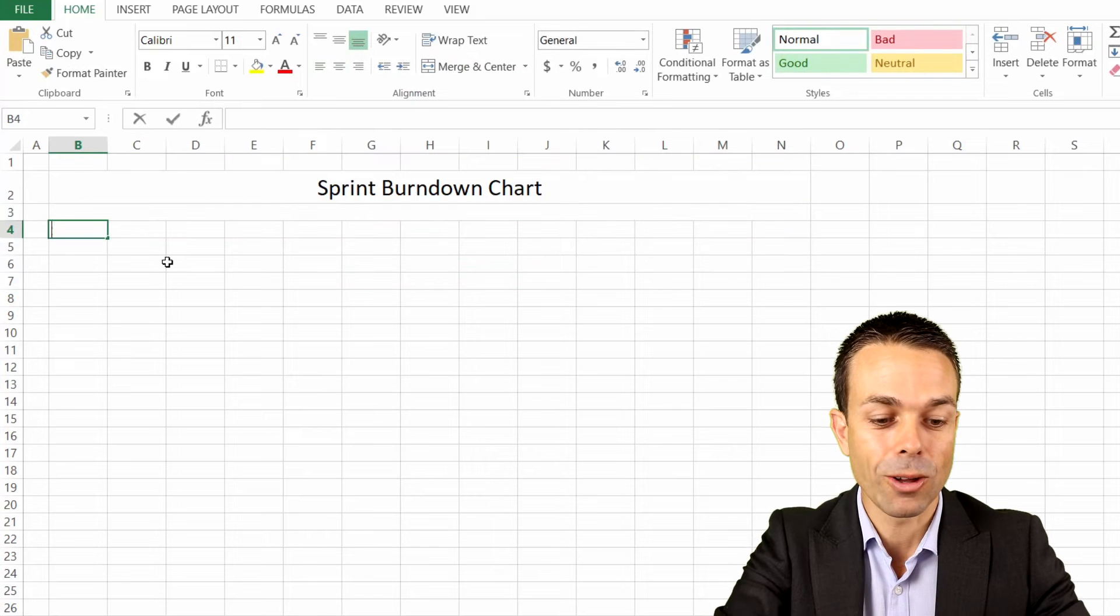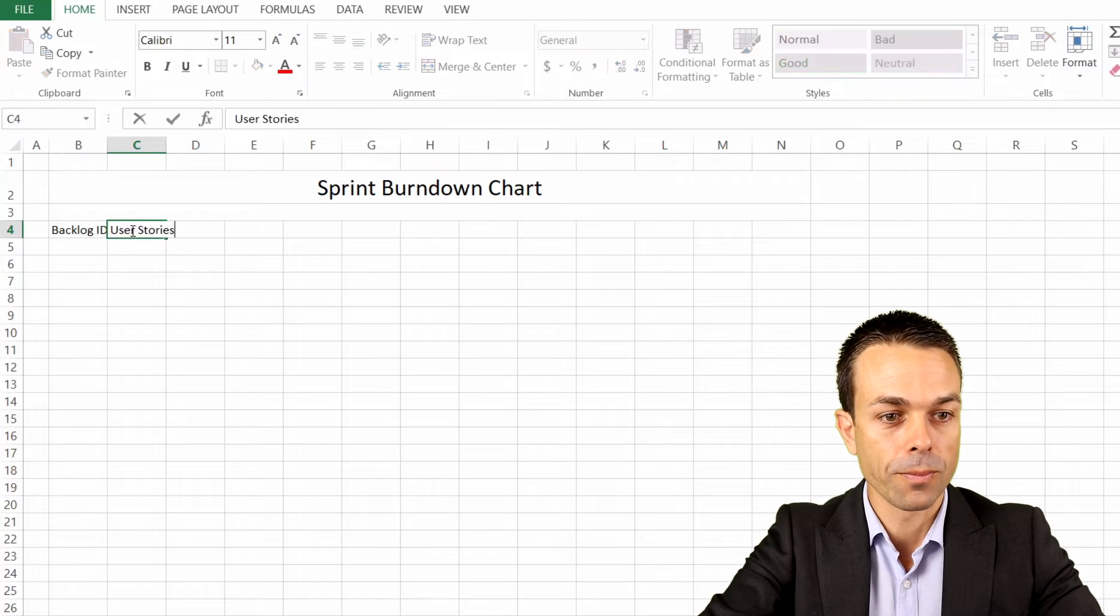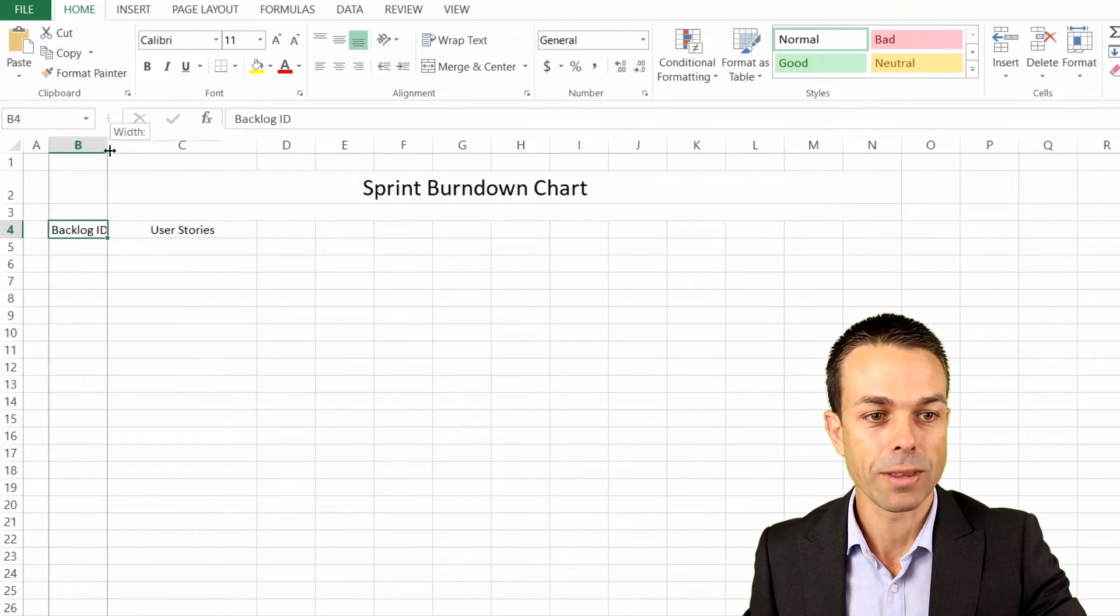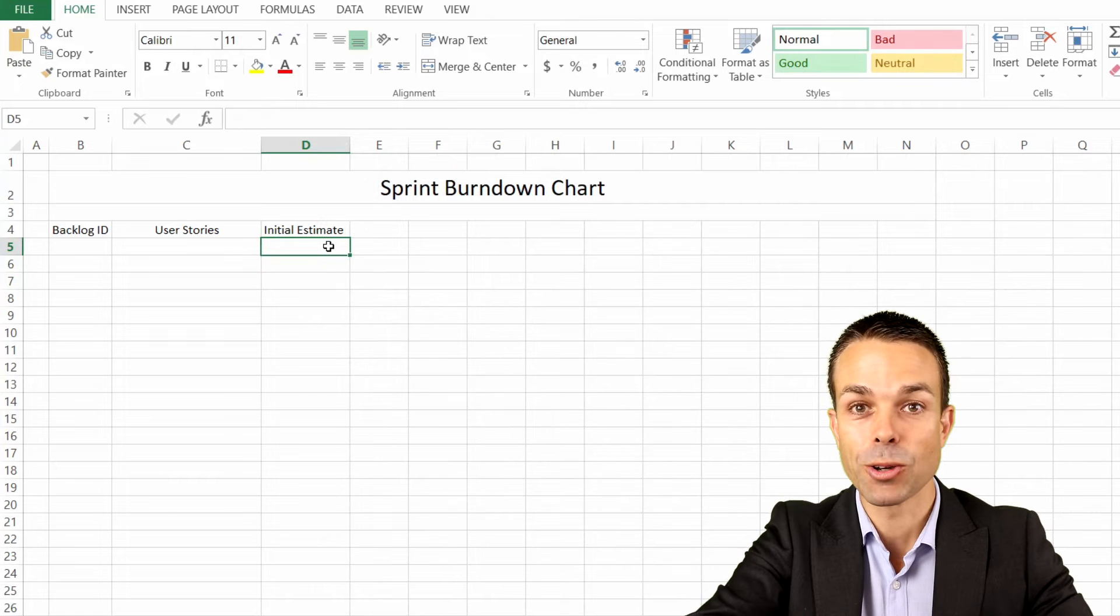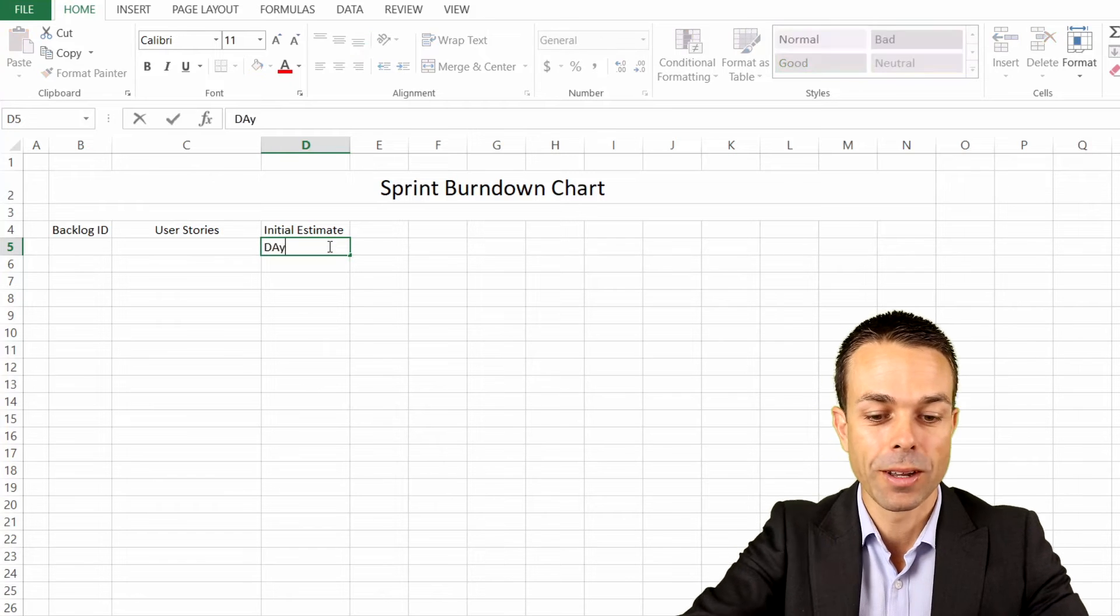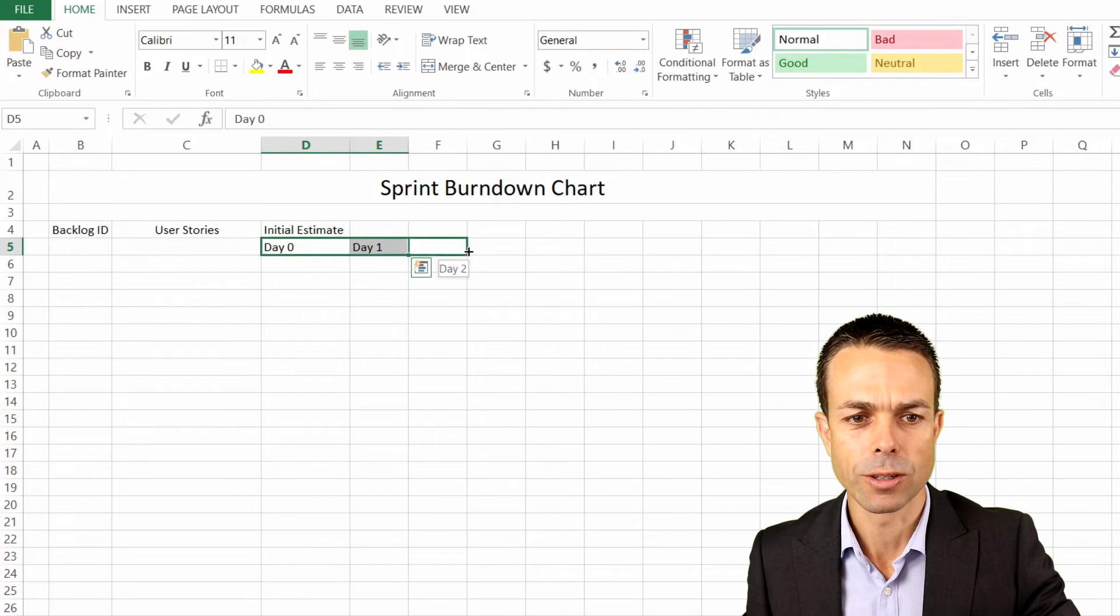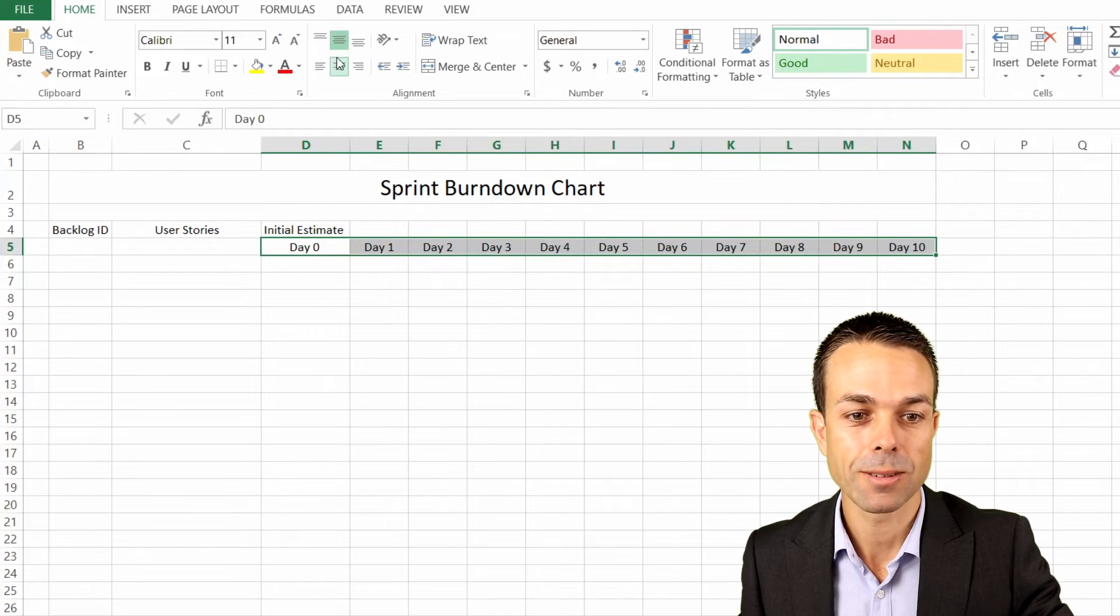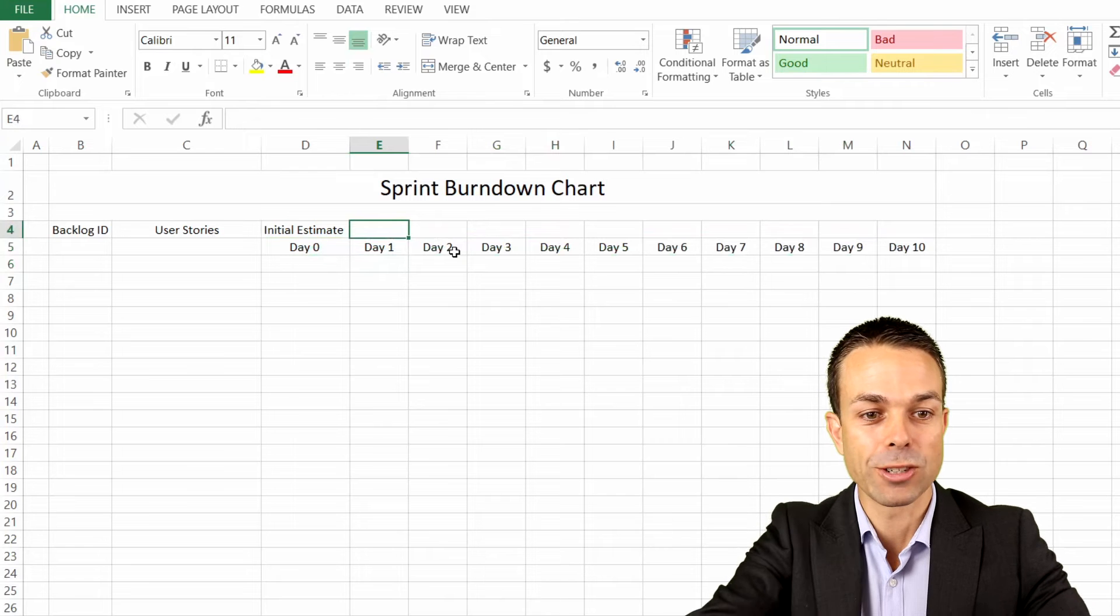We start with our backlog ID, and then of course we go to our user stories. We might make that just a little bit bigger and center that as well. Then we have our initial estimate. Now we're going to give ourselves the days. We want 10 days in our sprint, so five days in a week and two weeks for our sprint. You can have more or less, that's completely up to you. We're going to start with day zero here and then go to day one. Let's see if Excel will pick up the rest of these for us. That's what we want, all the way up to day 10.